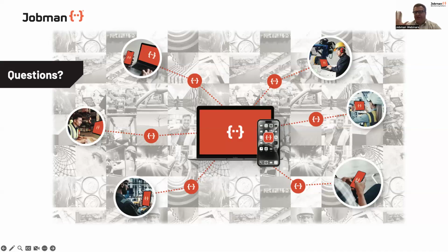So say job 600, it's going to create job 600.1, and you can build a workflow management called maintenance or recut. It's very common in our system. What that then means is you can add the new materials that needed to be ordered or sourced from inventory into that work order. They then follow the same process.